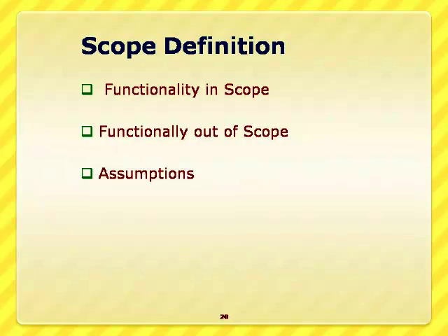Otherwise, what happens if I don't define the scope definition document? In the middle of the project, some influential top management person may come and say, I want this requirement to be added into the data warehouse. Then what happens? You can't say no to him. We try to introduce his requirements into the data warehouse, then the scope increases, you need to redesign it and the project implementation gets delayed.